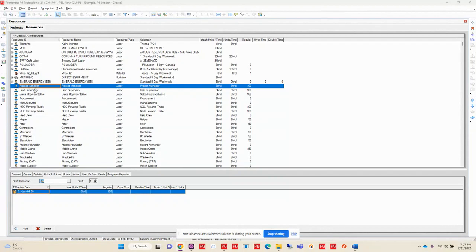And I can see that down here at my bottom piece, I have a bunch of straggler resources that have been imported in that didn't have anything of any type of file structure that went with it. So they just come in at the bottom of your resource dictionary. P6-Scrubber will help you land those into the proper hierarchy that you want to put them into.